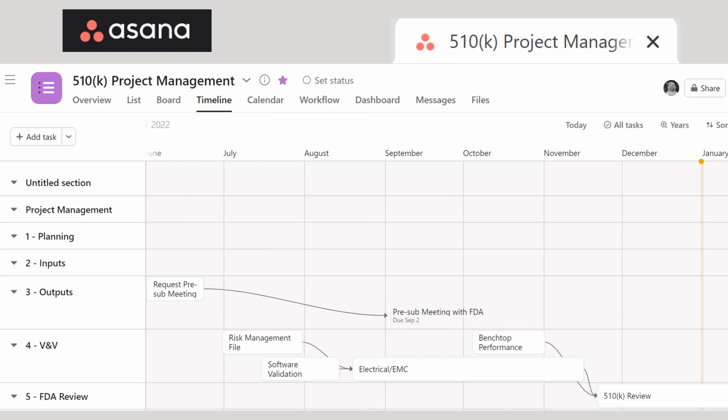And if this were actually a blood glucose reader that we were doing this project for, there's a 350 person usability study that I have to do. That might take me a little time to recruit for. So this benchtop performance is just one test. If I have to do usability testing for that kind of device, I might need more time, and I might need to actually start that right after the pre-sub meeting, maybe in September sometime, and I'll be lucky to get that done by Thanksgiving.